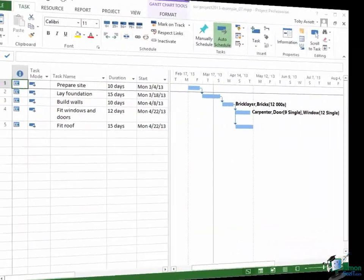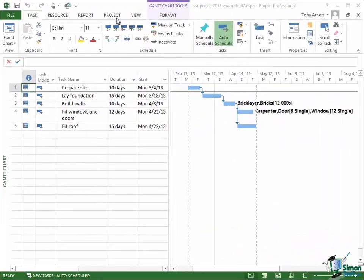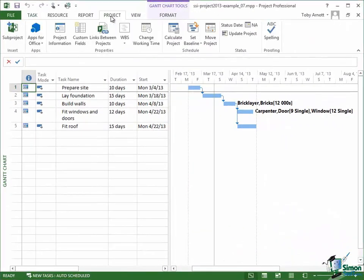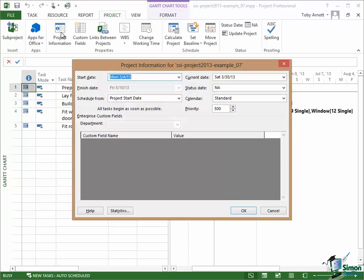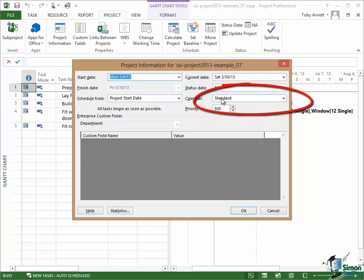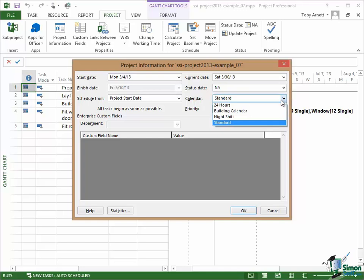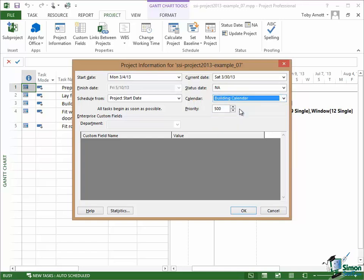So first of all, let's go to the Project tab and then on the Project tab in the Properties group click on Project Information. Now when you click on Project Information you'll see that the calendar in force is still the standard calendar. So I'm going to change that now to be the building calendar. Click on OK and the calendar that I've selected there is now effectively the base calendar for this project.